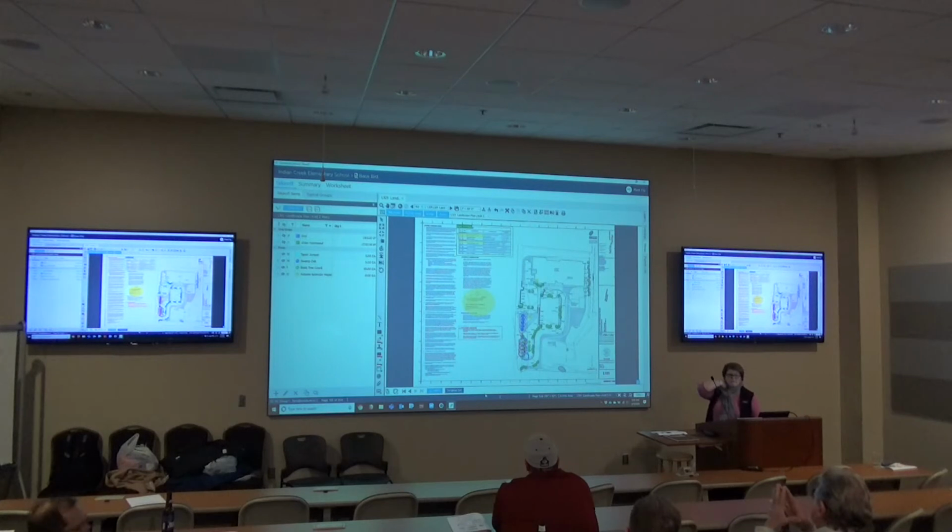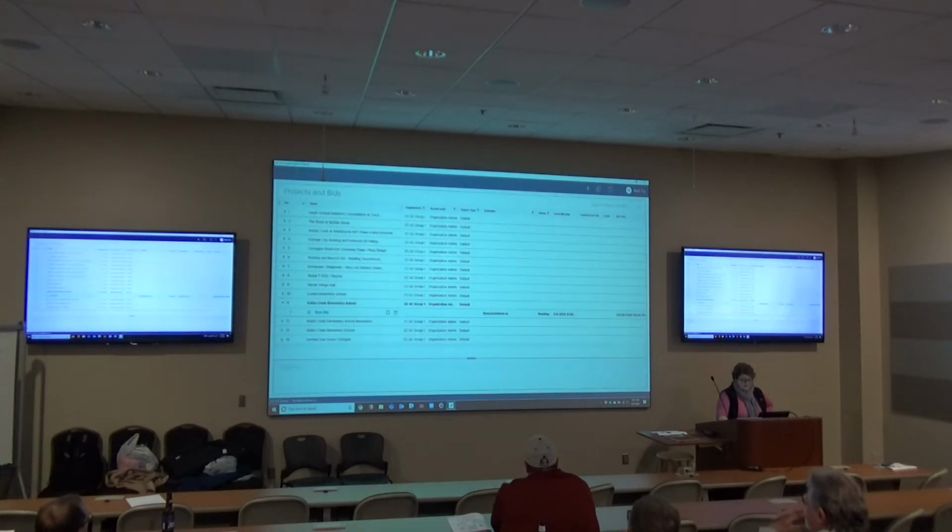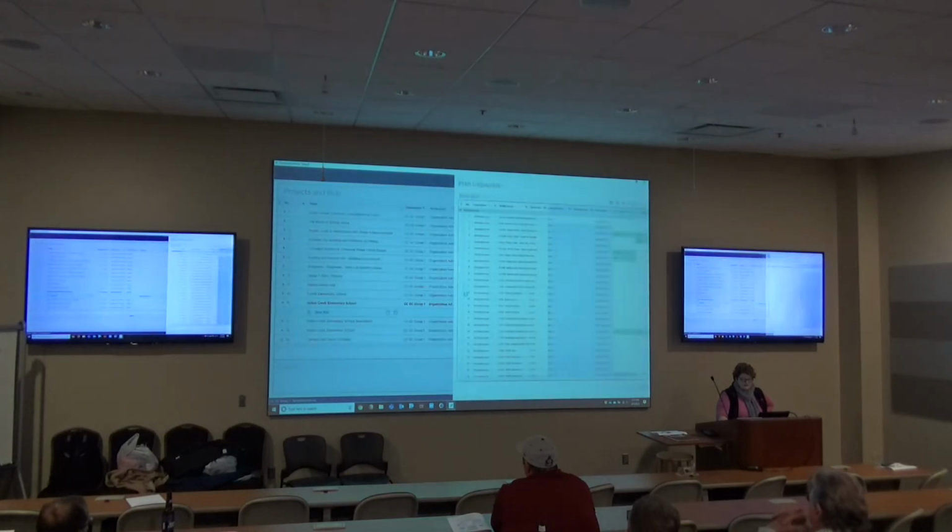So if you're using OST, well, to my knowledge, and I have a set of 100 drawings and 30 new sheets get issued, I have to bring those in, convert them to a TIFF, and pick the right overlay for the right sheet. Feel your process pain. So what's it like with this? Let me show you what the organizer looks like. The process for you is nothing, because the program does it automatically with the curated process behind the scenes.